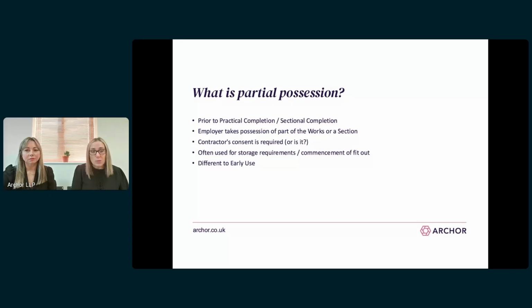The unamended JCT wording requires the contractor to consent prior to partial possession being taken, but no surprises, the JCT is regularly amended to allow an employer to take partial possession without the contractor's consent. And the result of this actually is that there can often be disputes over whether partial possession has actually been taken. Partial possession is often utilised by the employer for the commencement of fit-out works, and we regularly see it where works are in delay, and for whatever reason, the employer is then trying to minimise the overall delay.